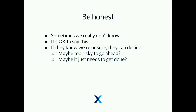Be really honest — sometimes we really don't know how to do something, and it's totally fine to say so. Sometimes we have to go to the client and say, 'I know what you want; we actually have no idea how we're going to do it — it might take 20 hours and it might take 100. Is it okay if we spend four or eight hours doing a spike to figure out how we can get closer, and then come back to you and be more specific?' They can then decide what to do. They might say it's not worth the risk, or they might say go ahead and spend a little time up front, then reevaluate once we have more information.